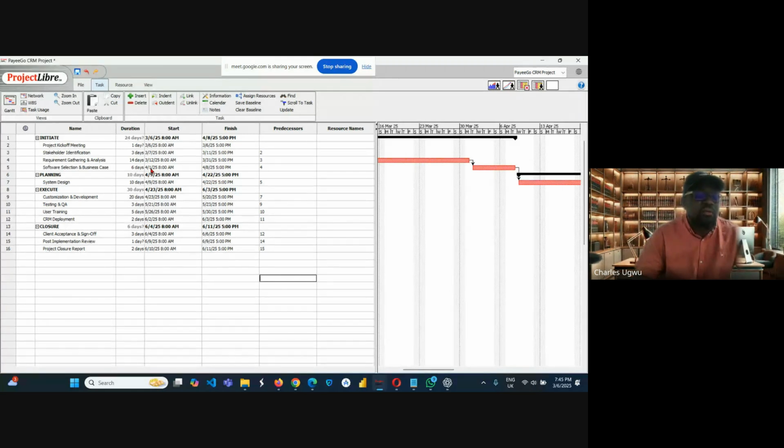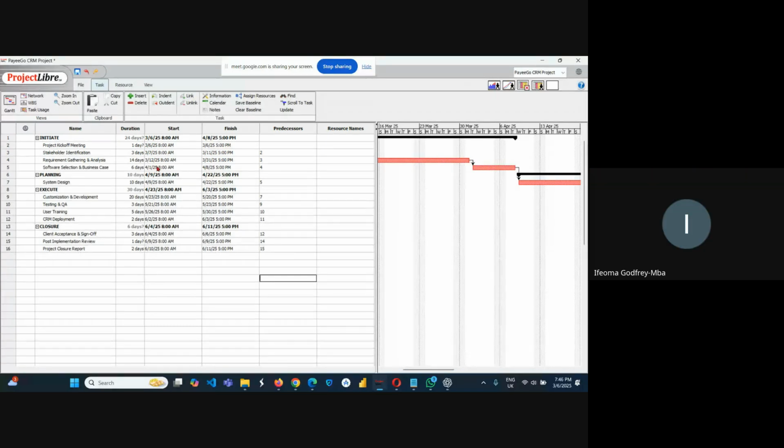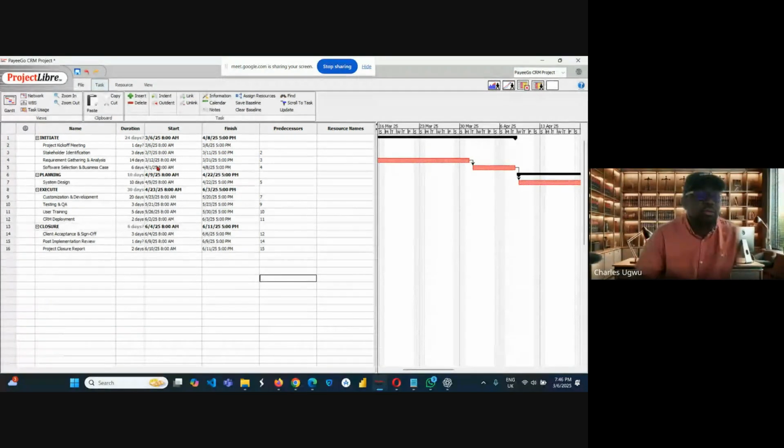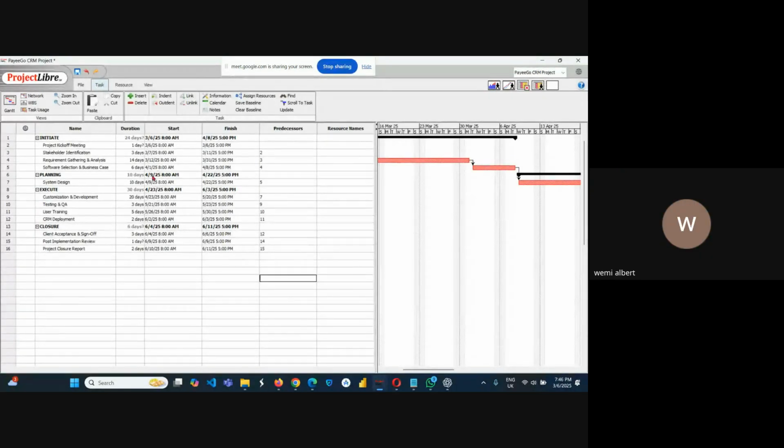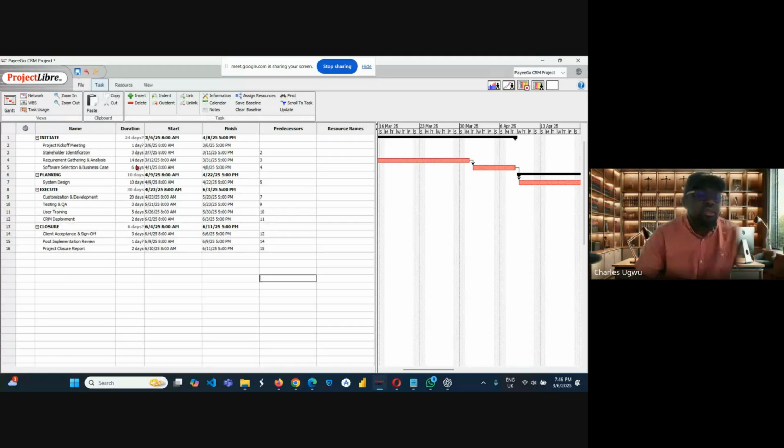Can you see that? Are you following? Yes, sir. If you see here, all you need is calculate how many days you think you can do this. You put it, the system will calculate it and tell you when it's starting and when it's going to end based on your predecessor.